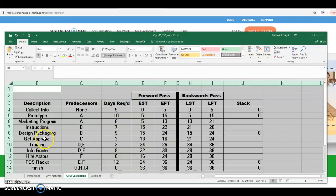Get approval is activity C, which is a predecessor of activity F. C finishes on day 13, and then with a three-day duration it finishes on day 16.